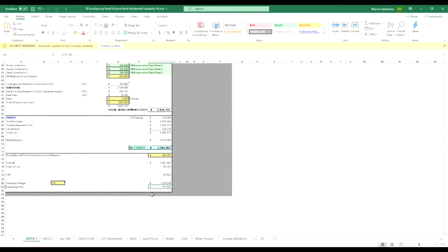And if you look at the contingencies I've built in on this one, I've got above 25%. We've got 970,000 there. We've also got a contingency of 5%, another 150,000 up the top here, where I've put that contingency in there. And I always do that on these developments to be conservative. And if they manage this project well, they will come out with more than 40%.